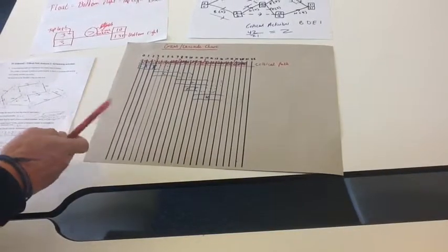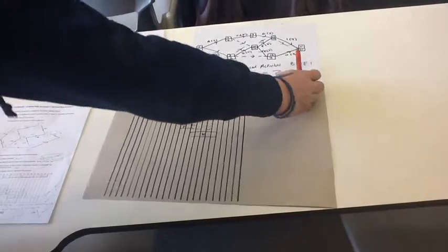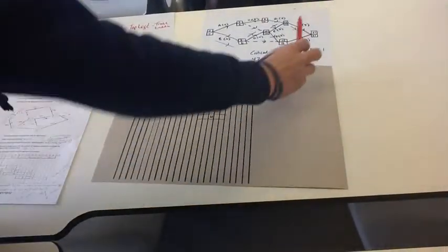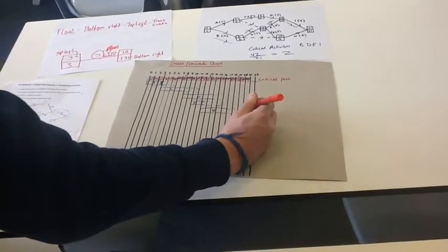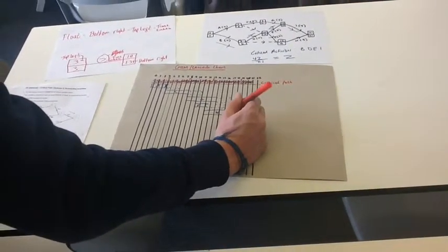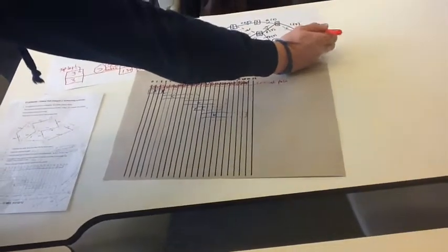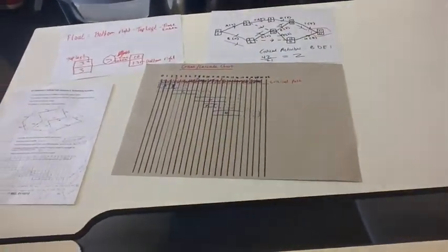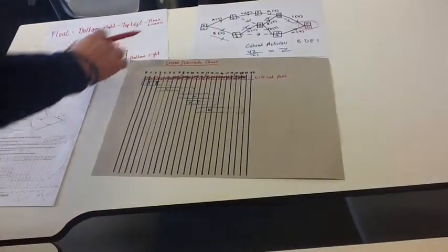And then H starts there. And again, you've got this little float, it's 21 minus 12 minus 5, and then you get this float, and it doesn't actually have to be finished until the last day, and then it still won't delay the project, because as you can see, nothing actually depends on it, because that's the end of the route, it's the end of the path. And so that's how to work out the float there.